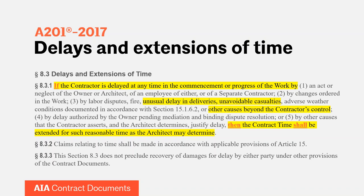An important nuance: some contractors may misunderstand when the architect becomes involved in delay claims. Under subsection 3 of 8.3.1, the contract time is already going to be extended at the time the architect becomes involved. The architect comes in to determine the quantum — how long — not the entitlement. Entitlement is already determined if the contractor is delayed. Subsection 5 is a much broader catch-all: 'other causes that the contractor asserts and the architect determines justified delay.' Under subsection 5, the architect has to get involved earlier to actually determine whether the contractor's arguments justify a delay.